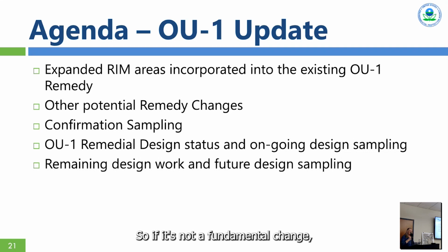If it's not a fundamental change, we have things that are called significant differences. A significant difference doesn't change the remedy for the site, but it may change how things are being done at the site. For instance, one of the changes we're considering is, instead of collecting confirmation samples while the holes are open, collecting the sample, analyzing it, and then backfilling, the PRPs have proposed, and EPA thinks it's potentially a good idea, to do borings around the area we plan to excavate.